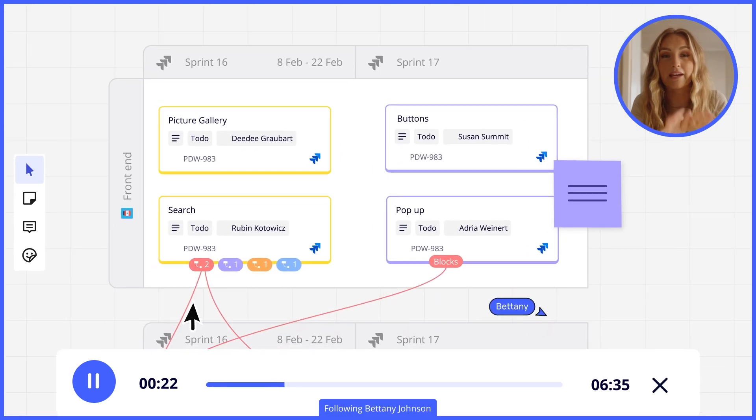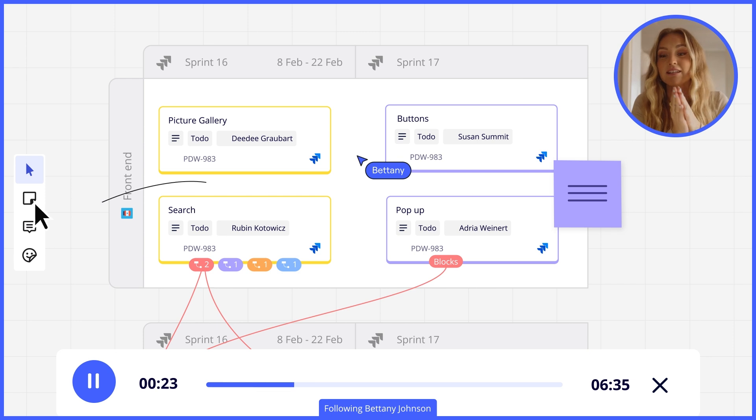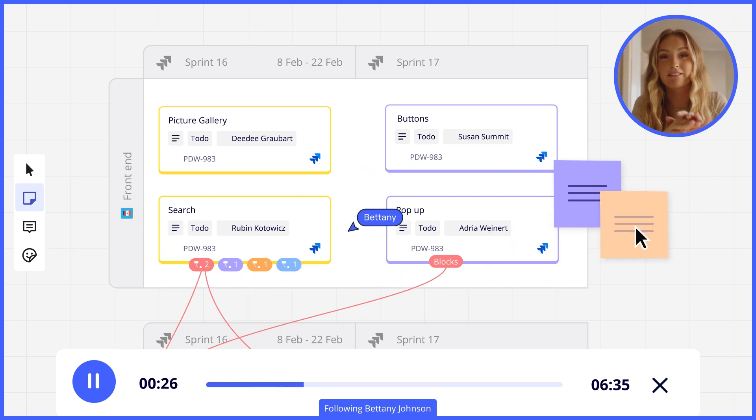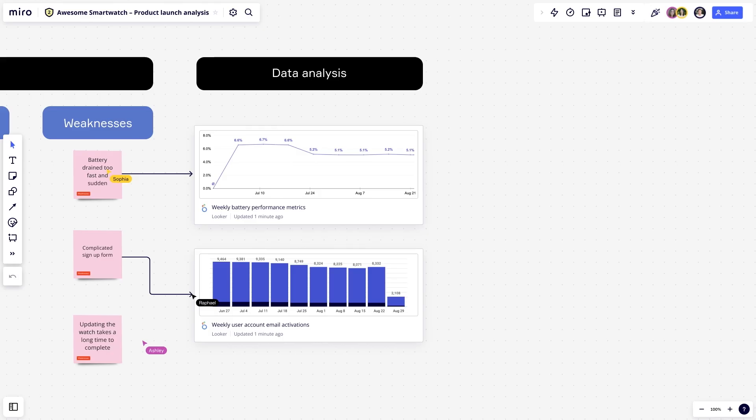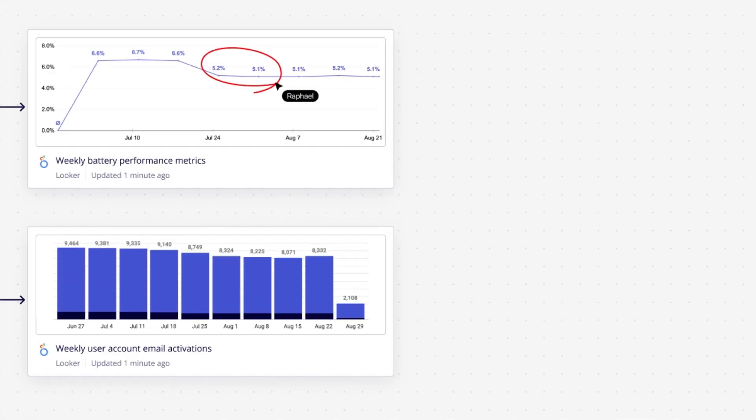Once a planned cycle is complete, it's time to review what we've built and how we work together. For the what, we share the deliverables with our stakeholders and other teams for feedback. This gives us a fresh perspective and helps overcome blind spots we may have developed by being too close to the task. Depending on the milestone, we might even release the deliverable to our end users as a test to learn from, or as a version we will continue to iterate on.